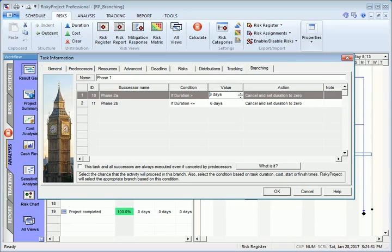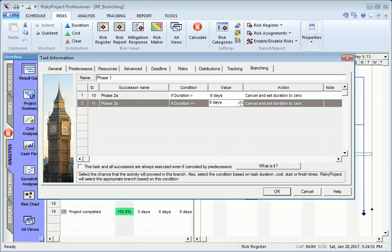Because task duration is an uncertain variable and is defined by statistical distribution, this condition will be met in some Monte Carlo simulations, while in other simulations this condition may not be met.